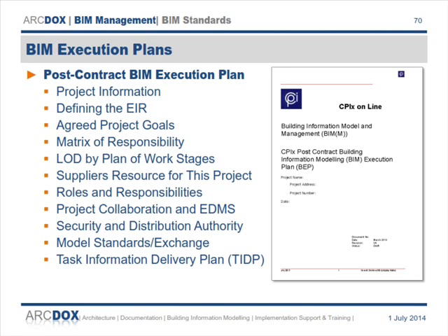One project we're involved with, the Kerry Group project down in Nice, there's 24 models now in the federated model. You have companies like the in situ concrete subcontractor producing a model. The partition subcontractor is producing a model. They never would have done that before.